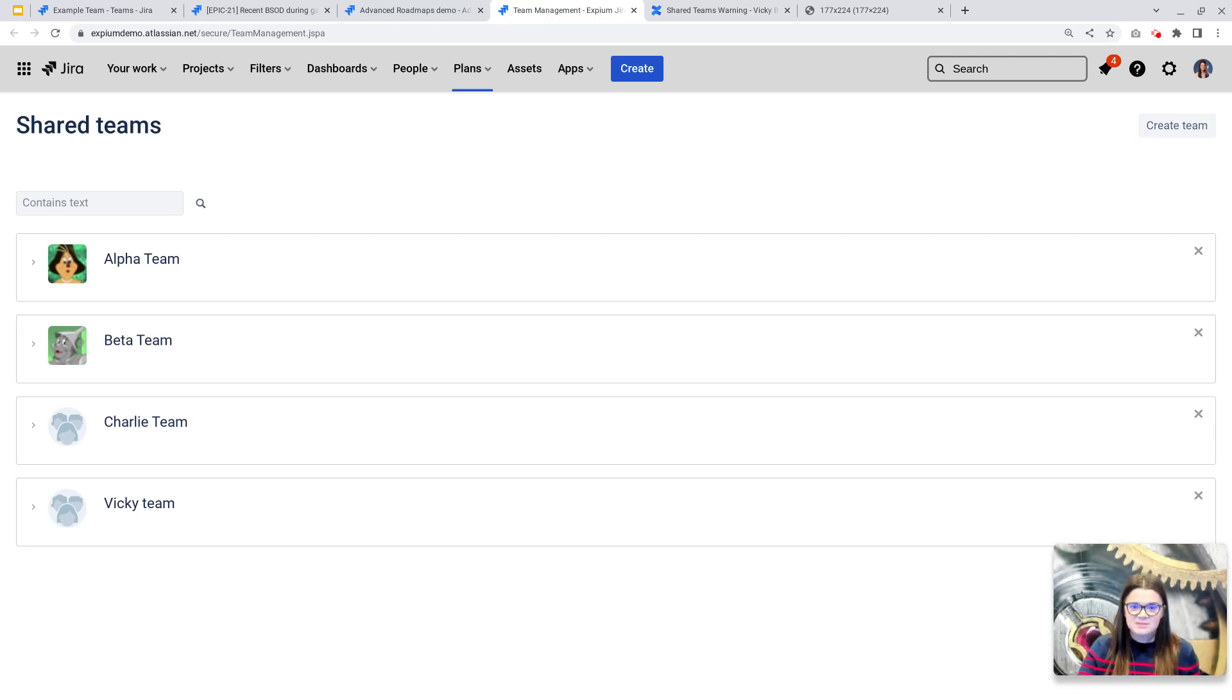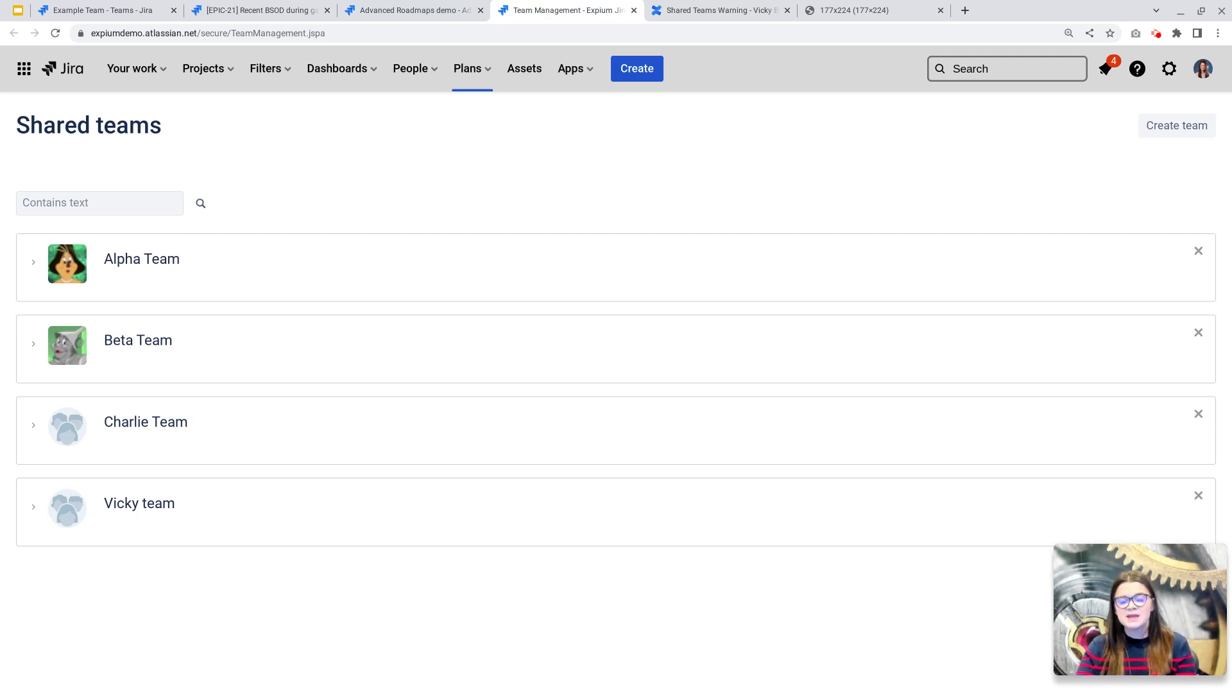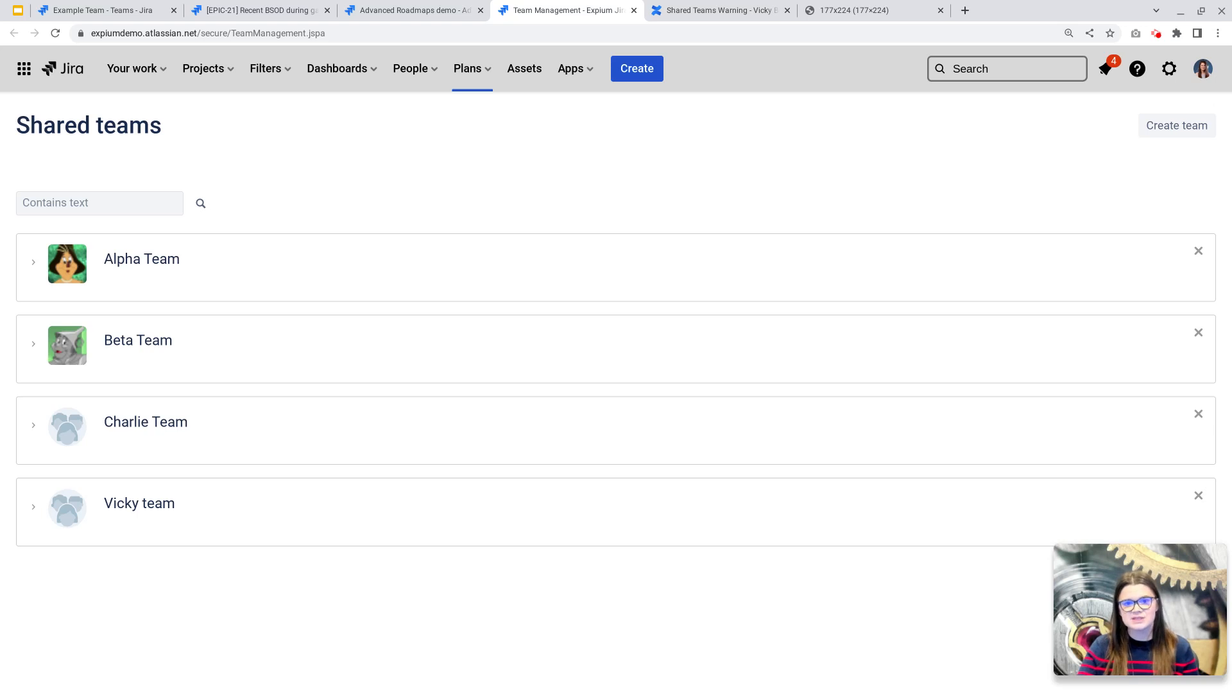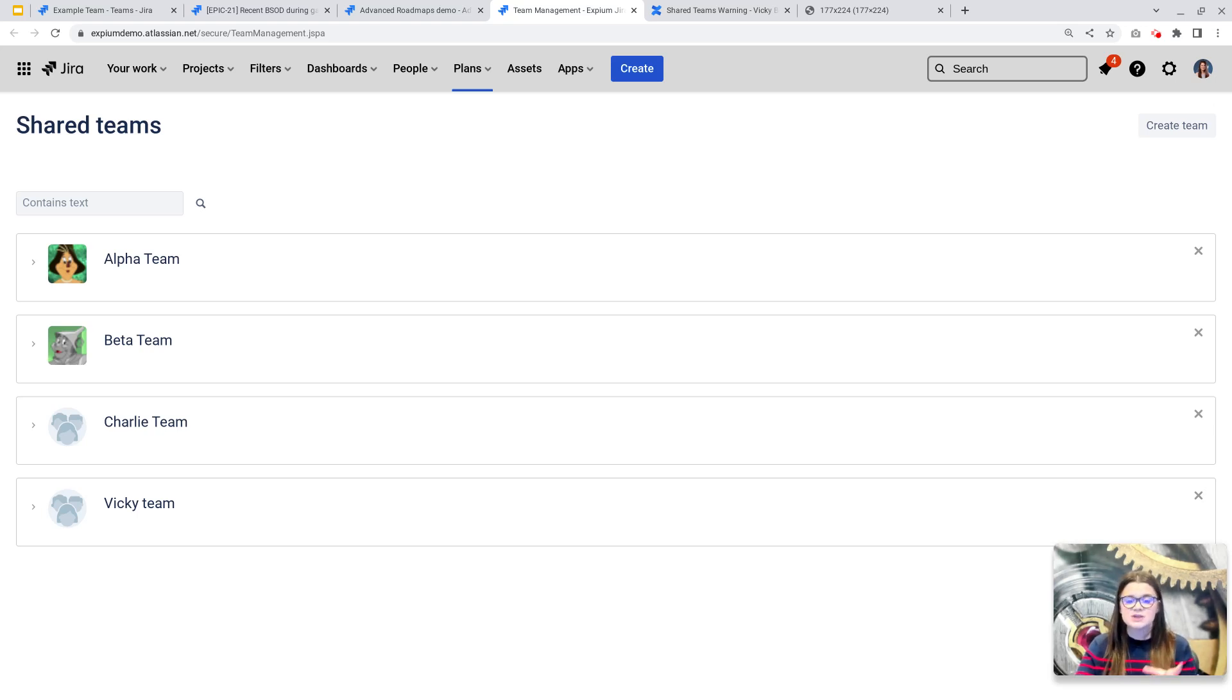Atlassian recommends keeping the team that originated as an advanced roadmaps team. This is going to provide the best data continuity as you go through this cleanup process. That advanced roadmap shared team is likely associated with one or many issues across the instance.